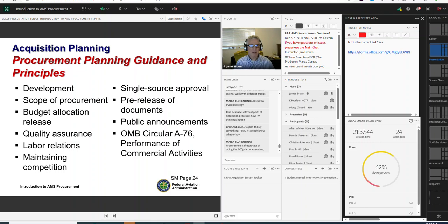Is there a trade-off between cost and schedule? Yeah, of course. You can always add more money to accelerate the schedule. Cost and scope: add more money to accelerate scope, or reduce the scope to lower the money. Same thing with quality. Those four items, if you look at the interdependencies, represent 6 trade-offs that should be considered. And if you do a good job, you'll step back and consider individually each one of those 6.